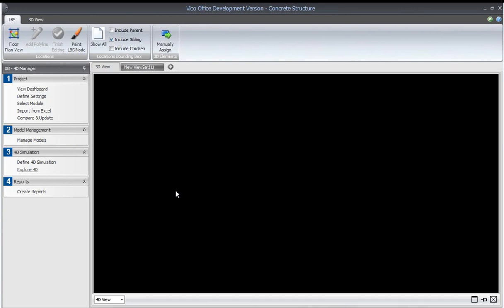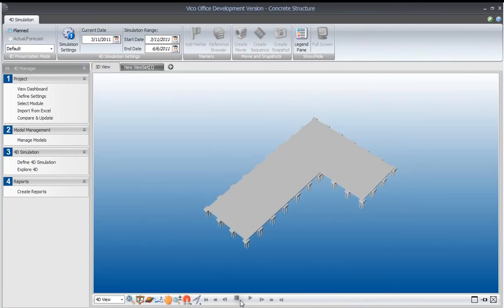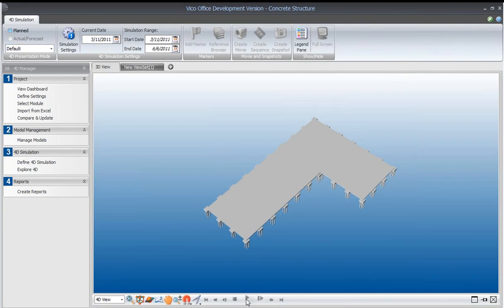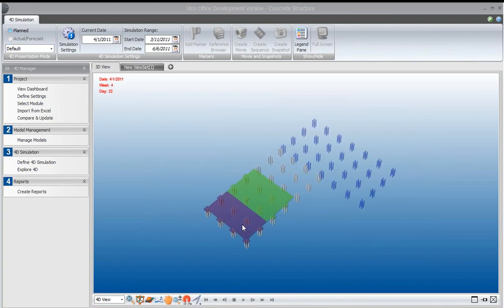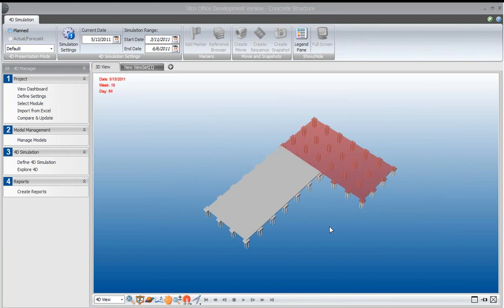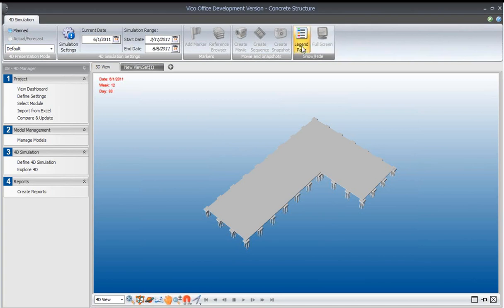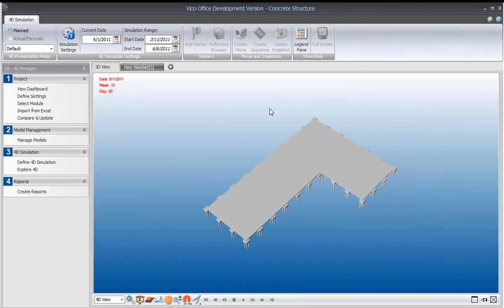When we explore the 4D, we will be able to see those same locations. If I hit the play button, we'll see over time how we start at this end and move through and work towards the other end. The different operations on each of those tasks show a different trade. The different colors you see represent a different trade, and you can have a legend that represents that and shows you what colors mean.